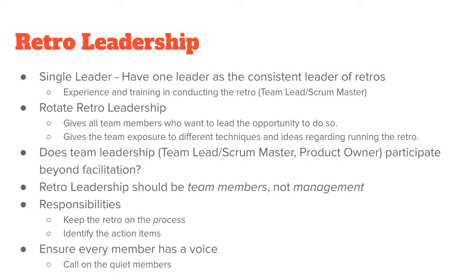So what we do is we actually have an epic that is comprised of the action items that came out of the retro. Those are added to the following sprint. Those are things that we want to accomplish. It might not be something that you can accomplish the next sprint, but you're saying this is where we want to go. It's either an action item or it's a goal of where you want to go. They don't have to be completed necessarily, and that's why we throw them as 0-point tasks on the board. Maybe they go across, maybe they don't, but at least we can keep track of them. We have an epic for them. Makes it nice and easy.